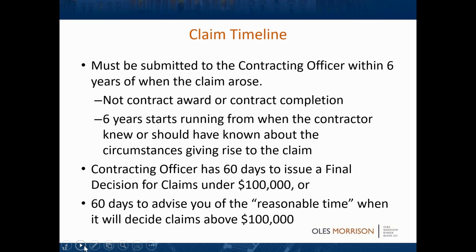Timeliness: you've got 6 years from when you knew or should have known about the circumstances of your claim arising.